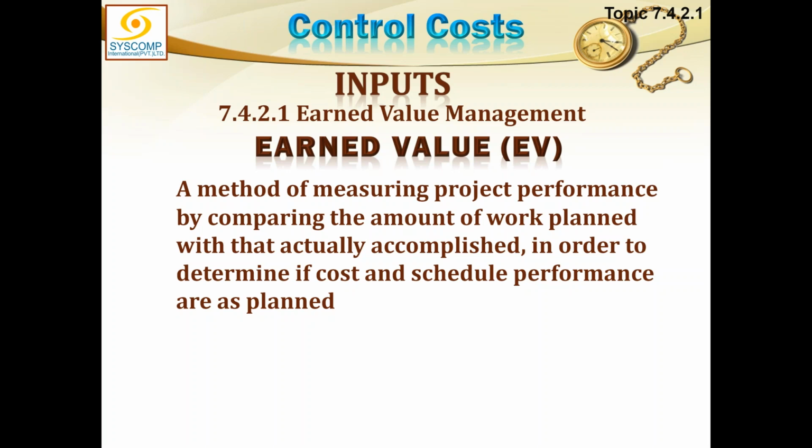That says that this much worth of work should have been done by this much time. So every point on S curve is a planned value, and the highest point on the curve, the last day's planned value, would be the budget at completion. Are you agreed with me?